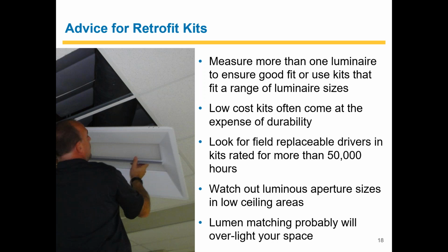So you want to make sure that as a contractor they're being taken care of properly, that they're being shipped properly, and that you're inspecting them before you start installing them to make sure that they're still of sound structural quality, because that's going to reduce punch list items and callbacks down the line.